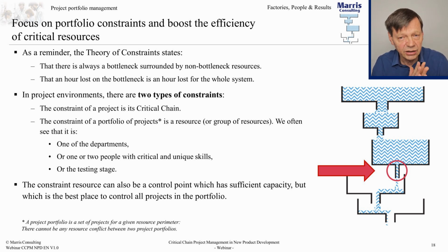The other is kind of crazy, and I guess you're just going to have to hear me and probably not believe me, but I've been doing this for decades. The number of times where it ends up being one or two people in the organization. You have 150 engineers in this building, and when you finish looking and understanding, you'll find out that it's just one guy, Albert, who's the bottleneck, okay? And it's partially a joke, but only partially. We can find him by counting the number of people running after him in the corridors, waiting for a signature or an opinion or whatever.